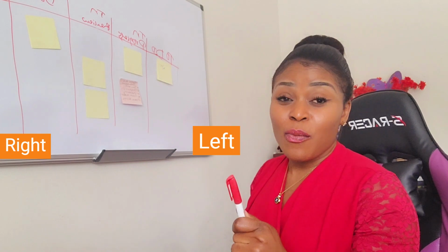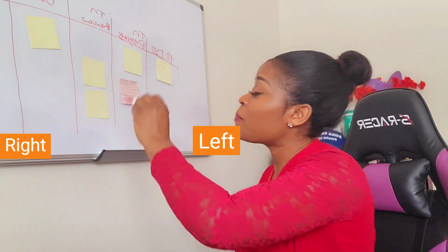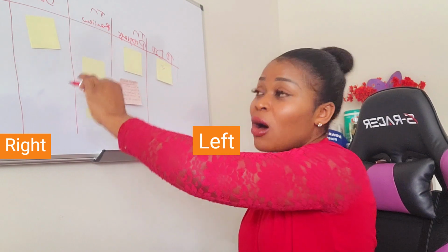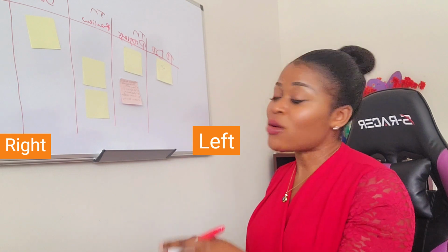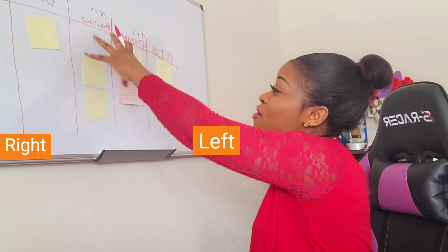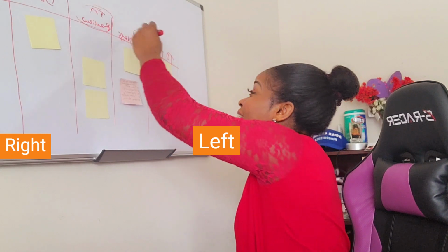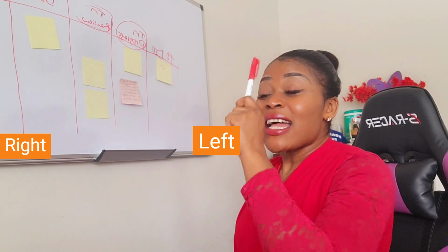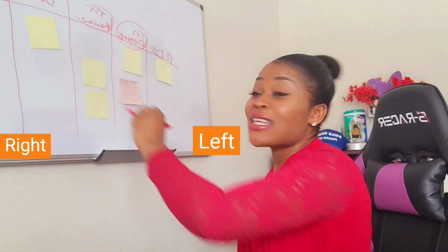So instead of calling people out individually, I'm going to be focusing on the work items. In this case, all the things that are already listed in the done column, I'm just not going to talk about yet unless team members have anything to contribute towards that. Okay, we will be interested and glad to know. But I'm going to focus more on review, because one thing I've noticed is that this in review column and the in progress column are usually those 2 columns that create a bottleneck, and we will end up with so many items that are almost done.